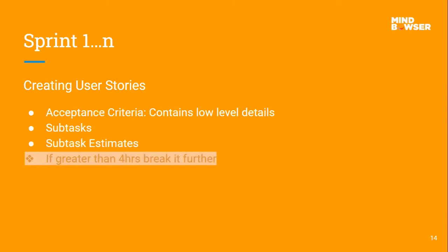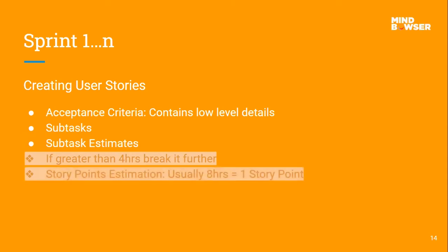For subtask estimation, we ask developers not to go beyond 4 hours, and if they think it will take more than 4 hours, we ask them to break it down further. That is how we do it, and it has been very helpful for us. That's why it's a pro tip from us.